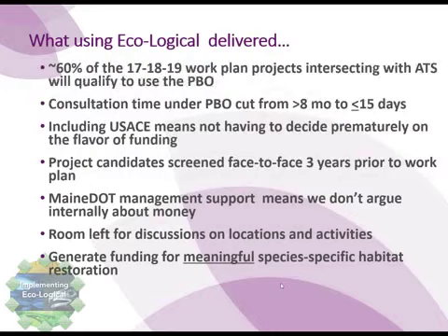Next slide, please. So under this programmatic biological opinion, 60% of those in-stream projects for the next 3 years, we now go to a 3-year work plan, so that's 150 projects that intersect with Atlantic salmon, they'll qualify to use this programmatic biological opinion.